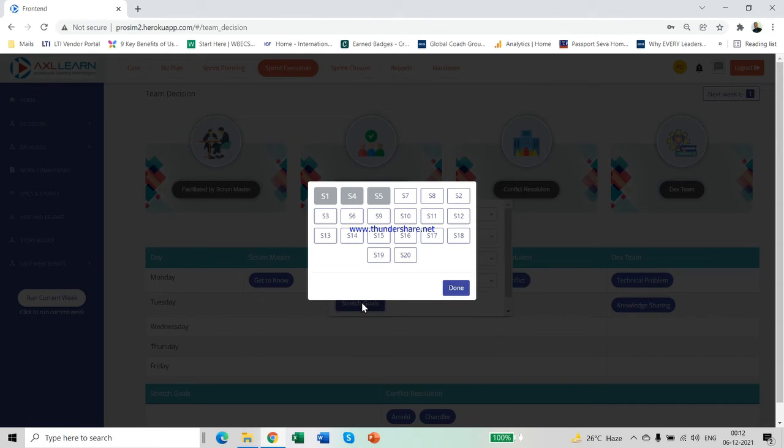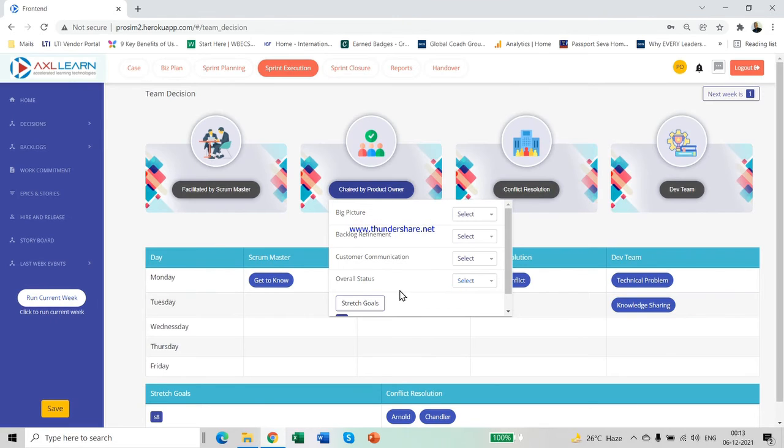In case the product owner feels that the dev team can commit to more user stories in a sprint than they have committed to already, he or she can suggest some stretch goals. This can be beneficial in increasing the velocity. However, the impact on the individual and team needs to be considered while taking this decision.